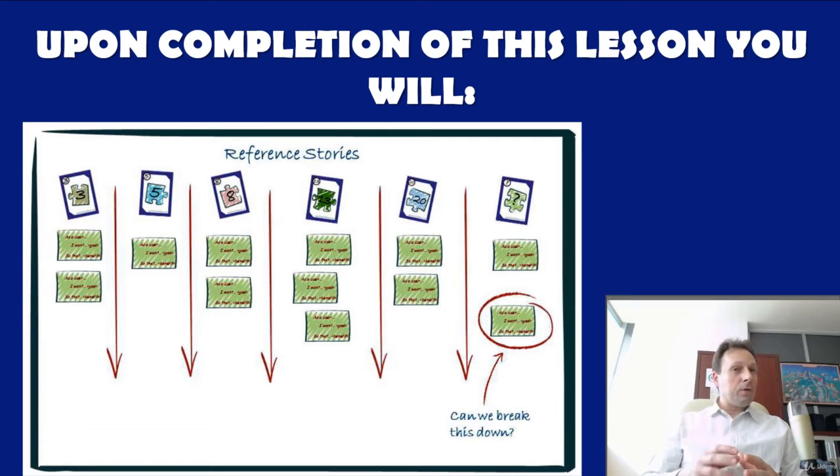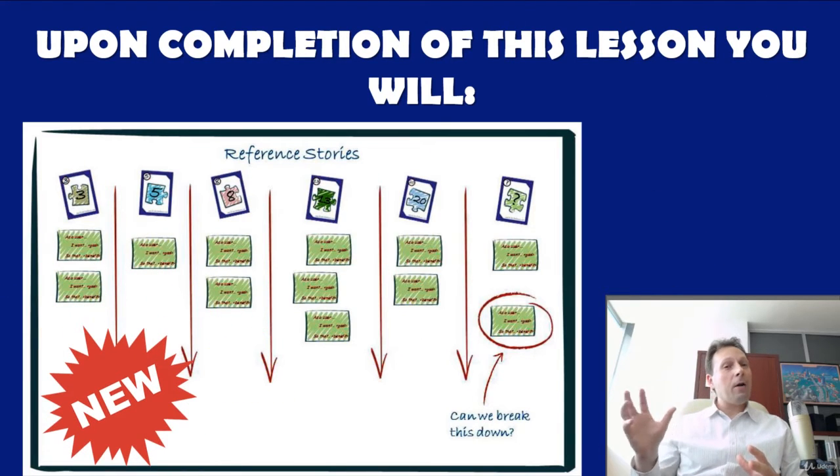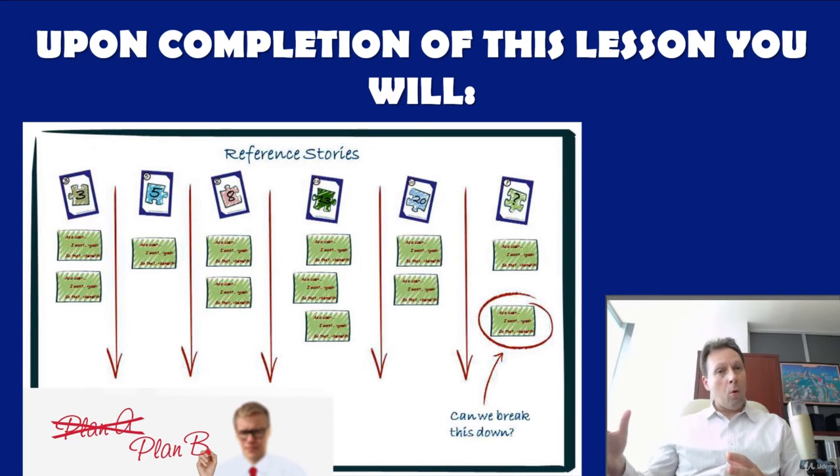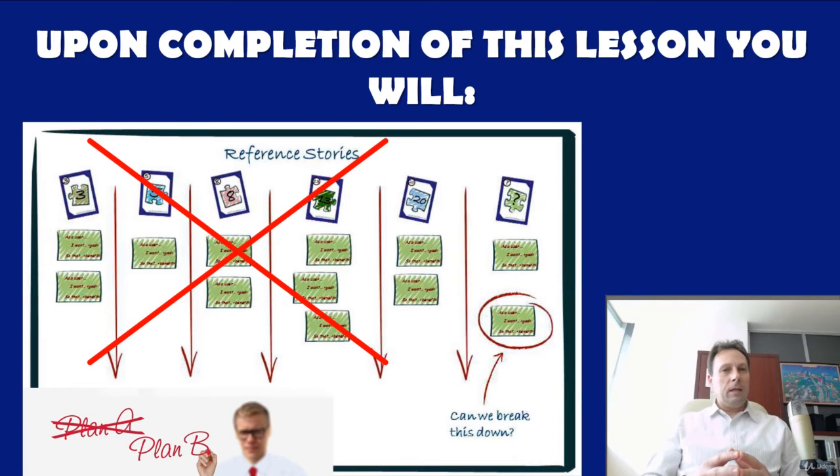However, if the product owner decides there is a feature of higher business value that needs to come into the sprint, the product owner should use the interruption procedure. If an interruption arises that so dramatically changes the priorities or scope of the sprint and cannot be dealt with as an interruption, the product owner may abort the sprint. In this case, the team stops, a new sprint planning meeting is held, and the new sprint is started. This can be extremely disruptive to the team, so the product owner should be very leery of stopping mid-sprint.